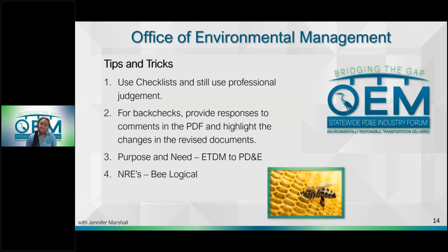For back checks, when you get comments back, especially from OEM, when you've gotten into that part of your review process, please provide responses to the PDF comments that we provide to you, and also highlight those changes in the revised documents so that we can go through and get the back check done as quickly as possible. The faster that we can go through the back check, the faster you're able to update your documents. We can get to approval, move on to the next very exciting project.